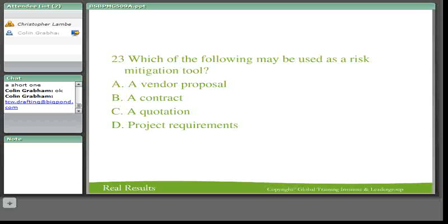And then, who authorized the change? Then you would put in your change control, if there was a change. What change control did you do? How did you do it, and what was actually changed? The how and what are quite big fields, so you make them fairly wide. Then the change control ID number, because you number your change controls.